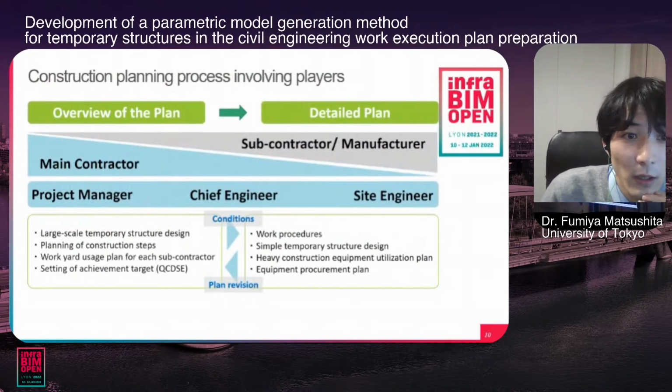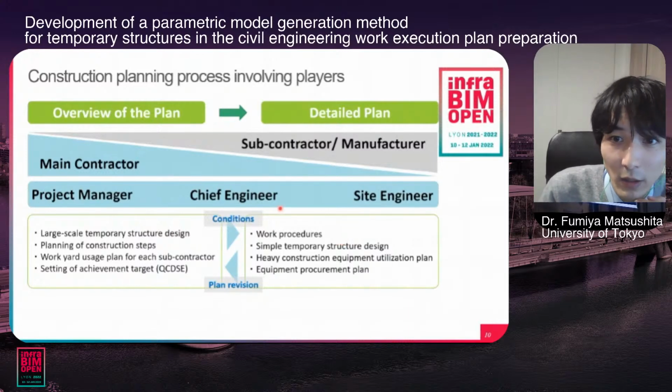Let me restart my presentation from this slide. This slide shows the players involved in the overview of the plan and detailed plan. The main contractor is mainly in charge of the overview of the plan, and subcontractor and manufacturer are mainly in charge of the detailed plan. Even within the main contractor, the overview of the plan is handled by managers, such as project managers, and the detailed plan is handled by a site engineer.